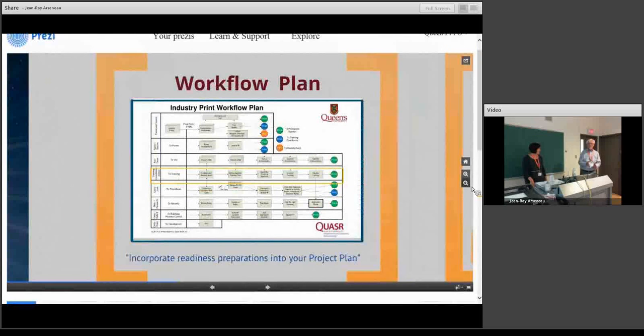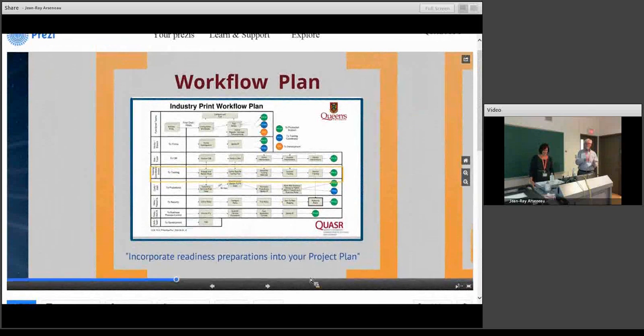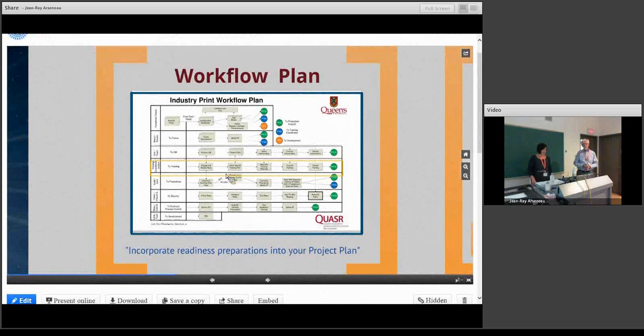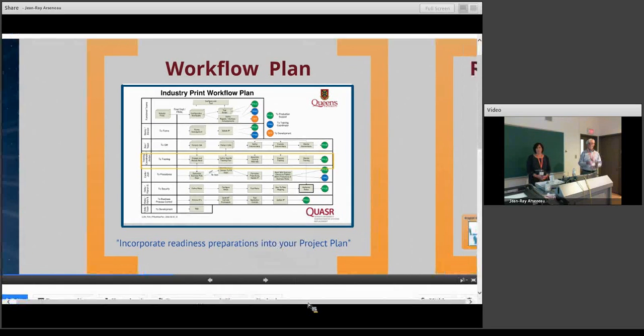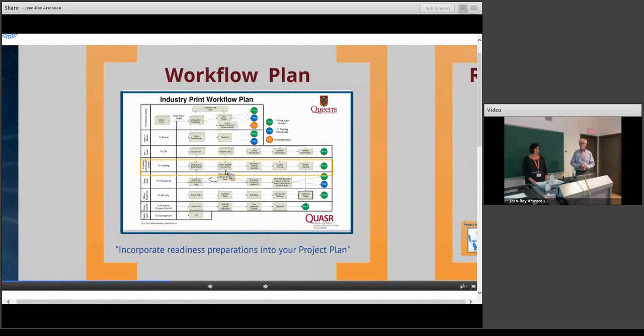And so we learned a very, very strong, hard lesson, and there are many Queens individuals in this room now that lived through it with Debbie and I. That was critically important. And then on the production support readiness, what were some of the deficiencies that we had there? We actually changed our production support model to a consolidated PeopleSoft sustainment group, and we hadn't worked out all of the procedures and processes and responsibilities, and we had to make some assumptions on staffing levels and skill levels in different areas of PS admin and DBAs and business analysts. Those were our best assumptions with what we knew at that point in time, but we needed to react more quickly when we found out that those assumptions were not accurate.